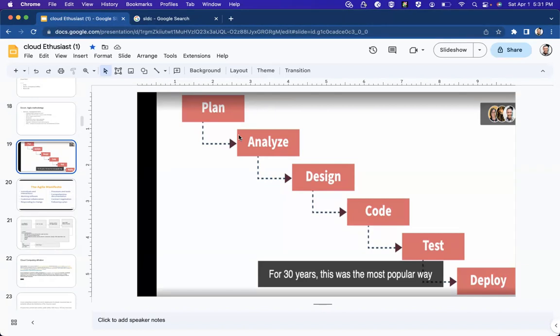So we talked about the board. You can either use a Jira board or Kanban. Jira is for when we want to use the regular Scrum methodology. The Scrum methodology actually talks about us agreeing on what we want to do. We put it in a backlog. Then we pick up one of the features, and we decide on the time. Okay, this is the product we want to release. This is the aspect of the product we want to release. Let's release this product within our first 1 month.